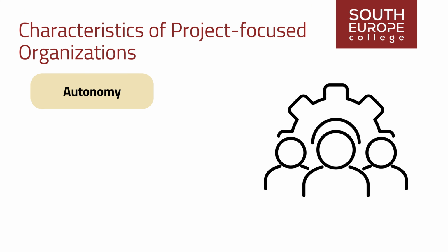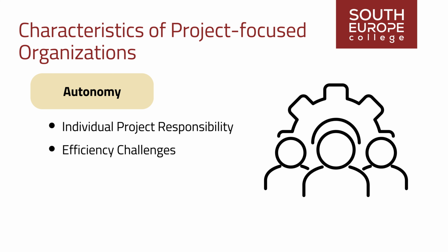Autonomy. One advantage of functional organizations includes the functions served by the resource's home department: recruitment efforts, coverage of absent resources, training, and establishing a career path for employees. The absence of these elements means that individual projects shoulder the load for each resource and have difficulty gaining the efficiencies larger departments enjoy. The independent nature of the project teams can also make it difficult to appreciate the lessons learned from previous projects. A disincentive to share these and benefit competing projects may even appear.